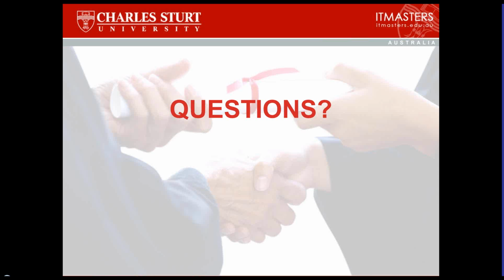And if you don't have it sufficiently negotiated and sufficient input, you get unrealistic expectations. You don't usually get people running out of things to do. But if you do, that's the easiest problem to solve, because you just pull something forward. If you get to the final iteration of a wave and you've ticked all your boxes and you've got it all done, you bring something forward. That's pretty easy. It's the other way around where it gets pretty hard. And that's usually because not enough input was taken from the technical development team, and the reality checks were too few and far between.